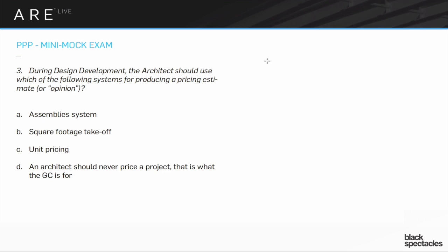If we think about this in the general way, the process is likely to be some preliminary work, pre-design kind of stuff. And then there's going to be SD, schematic design. There'll be design development, DD. There'll be contract documents, CDs. And then there's an interesting moment where things get gathered together, and there's the bidding phase. In that bidding phase, the architect actually has quite a few roles.